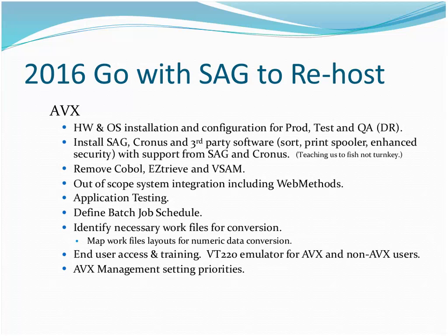Even before we went with SAG, we knew we were going to sign the contract. We had to get a head start with some of our system conversions that weren't SAG related. We still have COBOL, and we had a product called EasyTree, which is pretty much a report writer. Those programs had to be rewritten in Natural so that they could go with the conversion. You're not going to get COBOL on Linux. And we had some VSAM. Those files had to be converted to database. So we did some preliminary work to get ready so that we could actually do the database Natural conversion.